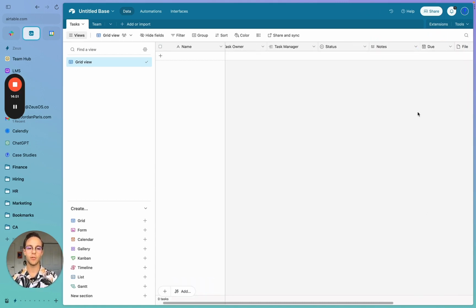Now, there's a couple more fields here that we need for the express purpose of connecting these automations that are going to be pretty cool later. And they're simple automations, but they save a lot of time and create a lot of efficiencies. The first one I'll share with you is, as soon as someone is assigned a new task in Taskmaster right here, they're going to get a notification in Slack saying, hey, you've got a new task, and it's going to link to it in Airtable. They can click on the link, they'll be taken to the task.